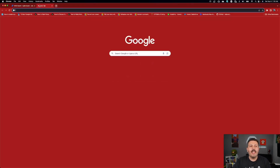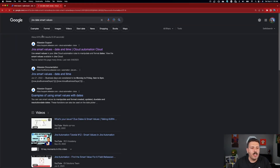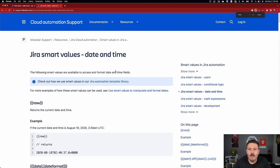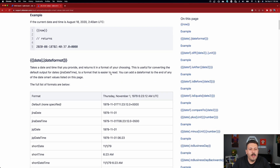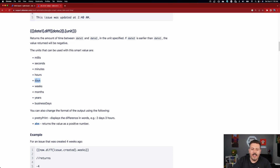One article I'm going to be linking below is about Jira date smart values. I'm going to be referencing this article — I don't have any of this memorized; when you have the power of the internet, we just leverage it. We're going to be using the function date1.diff(date2, unit). In our particular case, we're going to select days so we can calculate how many days elapsed between a specific date and another date.